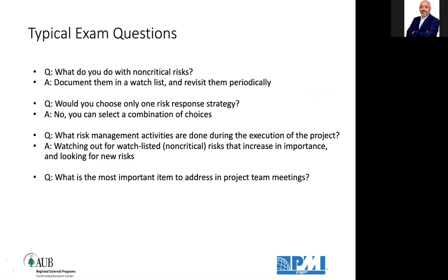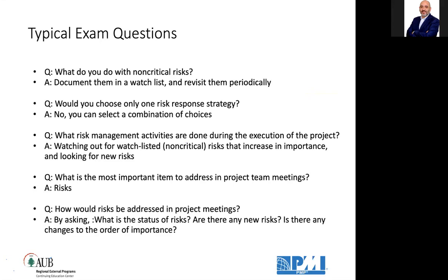What is the most important item to address in team meetings? Risks. How would risks be addressed? By asking the question, what is the status of my risks? Are there any new risks? Is there any change to the scoring, the magnitude, the order of importance? And how are we managing the risks?